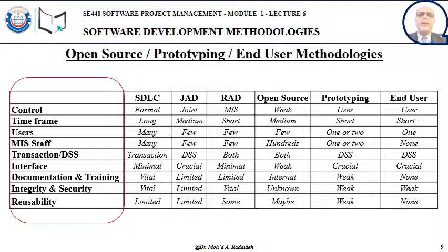The prototyping, it's a way to keep the customer in your loop. For example, instead of waiting until the end of the system before you present it to the customer, every time you have a few options or a few components ready, you ask the customer to give you the chance to present what you have in hands so far.